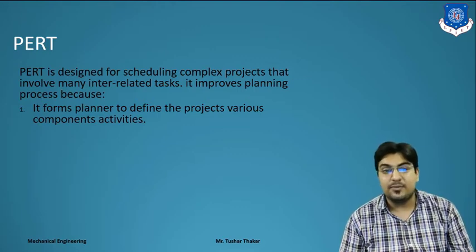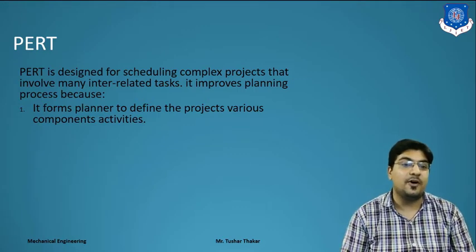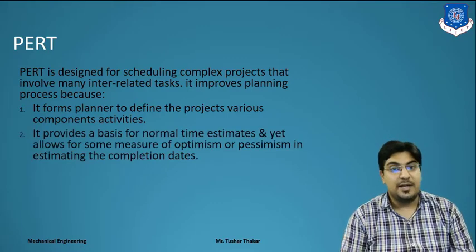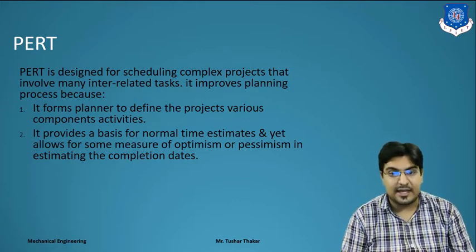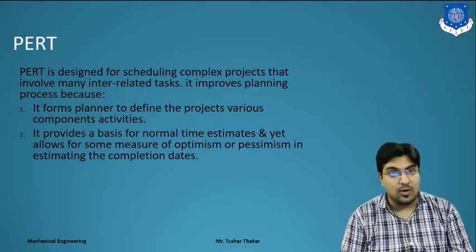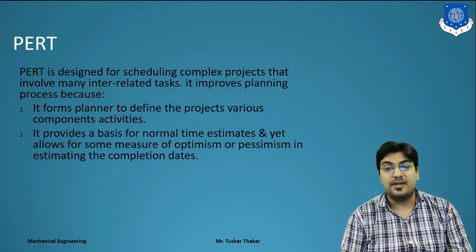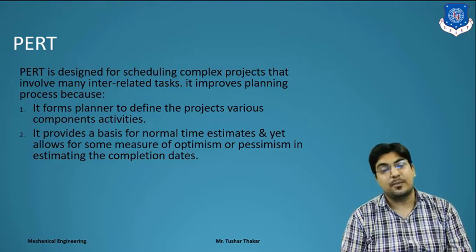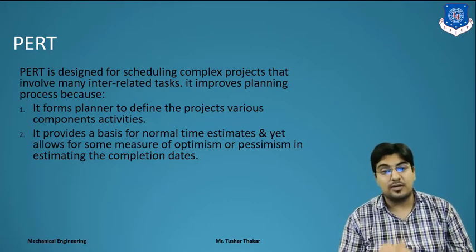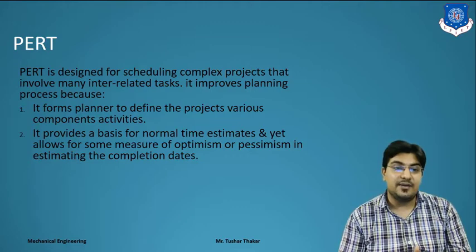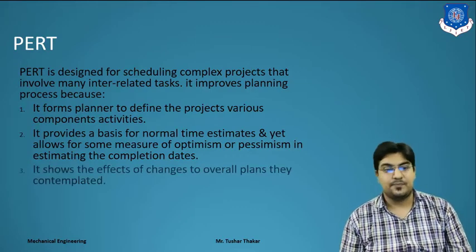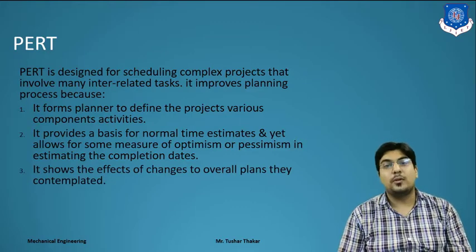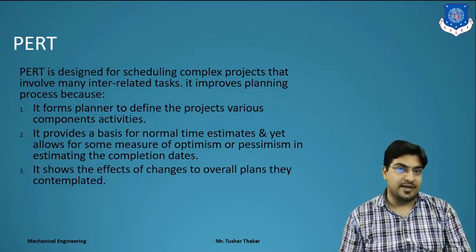It improves the planning process because it informs the planner to define the project's various component activities. It provides a basis for the normal time estimates, and it allows for some measure of optimism and pessimism in estimating the completion of tasks. Here we have to calculate optimistic time and pessimistic time for the project.